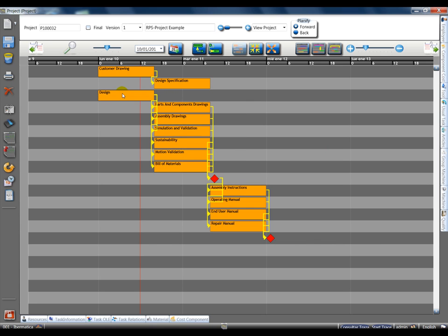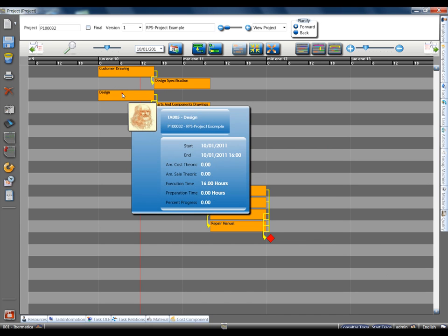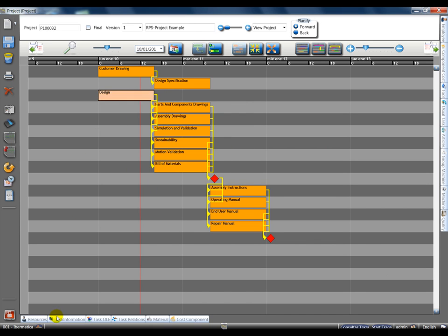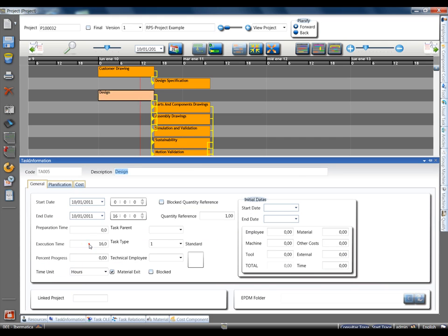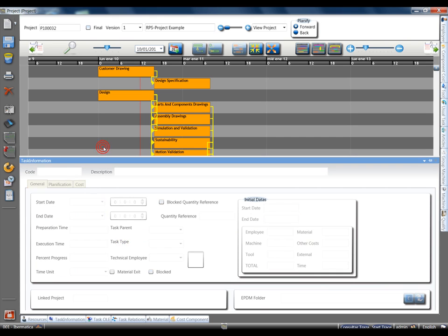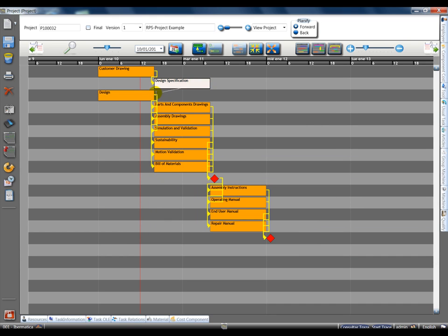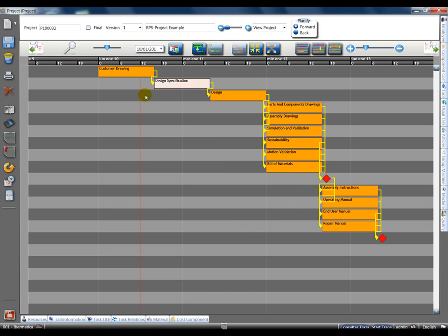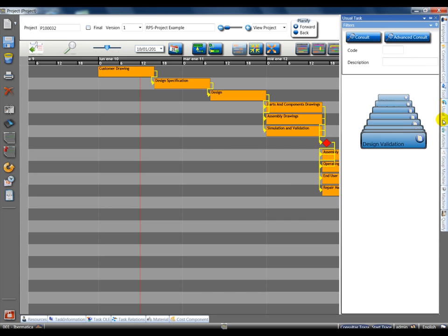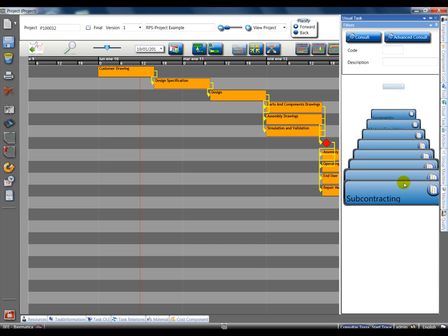You can delete or change the time of the tasks by extending the bar in the Gantt, or type in the new time on the task card. You can add or modify the dependency between the tasks by connecting the bars. Besides this, you can group together several tasks, thus managing them as a whole.